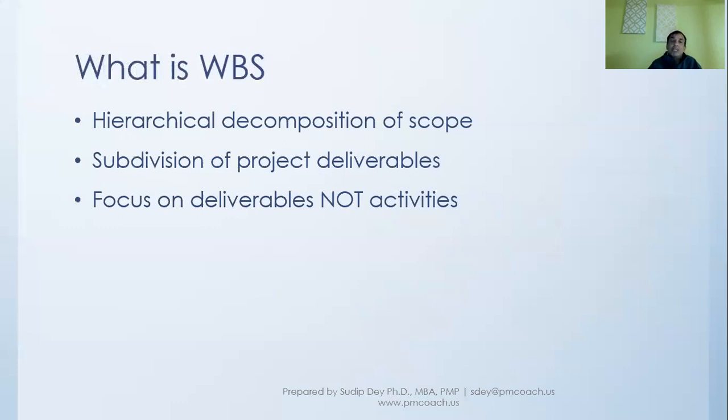Of course, we'll take this forward in another process to find out what the activities are. That's a different process. Here, when we're talking about WBS, we are talking about work at a higher level, and the lowest component in the hierarchy is what is called the work package.